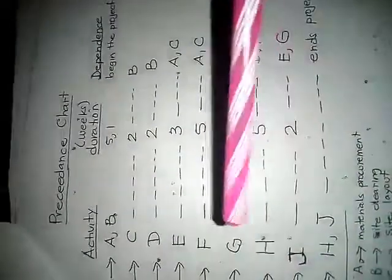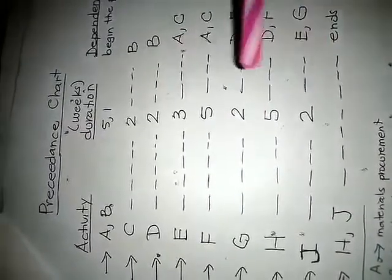You can do G, gotta finish D and F. You can do H, gotta finish D and F also. I you can do it, you gotta finish E and G, and activities H and I end the project.